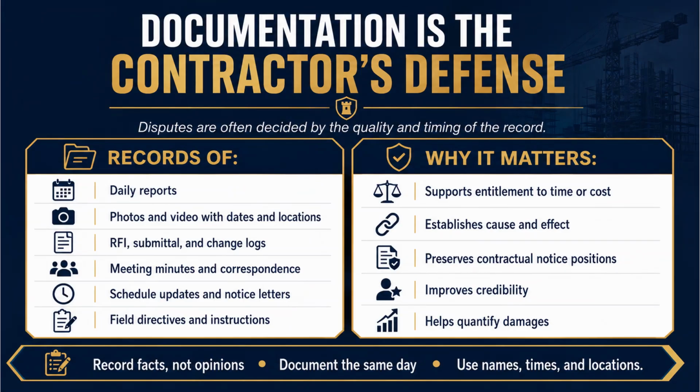This slide is the heart of the whole unit. And you've heard the theme before, but it bears repeating because it's that important. Documentation is the contractor's defense. Disputes are often decided by the quality and timing of the record. Quality and timing. Not just whether you have a record, but whether it was made at the right time, contemporaneously, the day the thing happened. We hammered that in Class 13, document the same day.